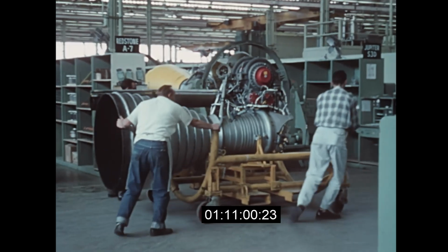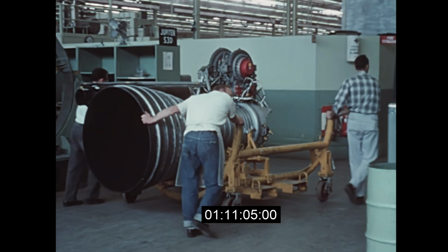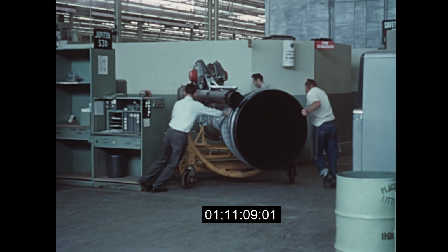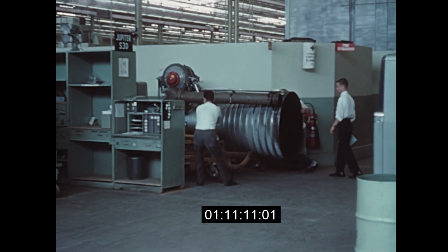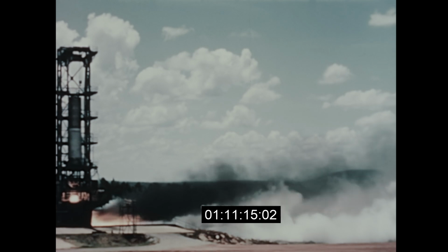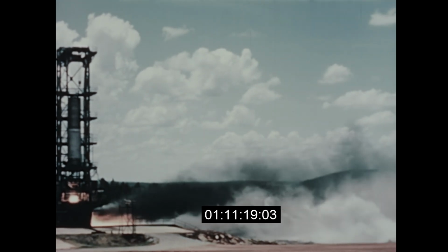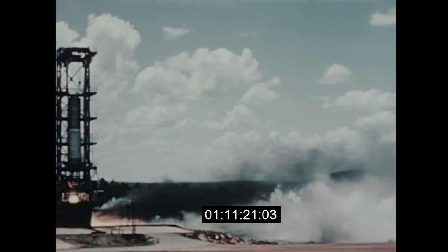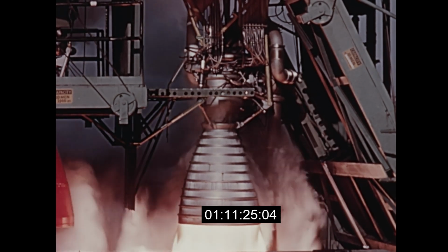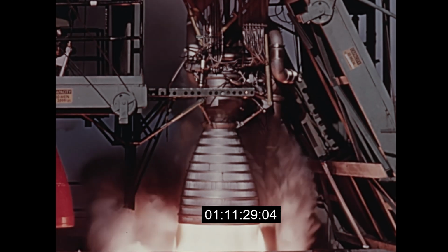The 5 engines built for research and development testing are in continual use, proving design modifications and system reliability. 3 evaluation engines have been delivered to ABMA. 11 runs have been made with these engines for a total firing time of 1,126 seconds without serious malfunction or delay. The H-1 engine now stands as a tested and proved design ready for its ultimate use. Power for Saturn.